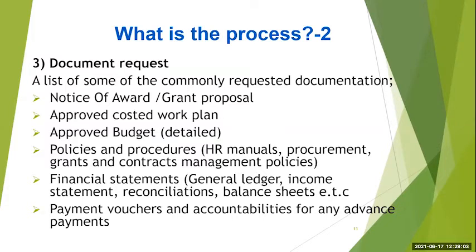So you need to make sure that everyone on the project payroll has at least an assignment on that work plan. Secondly, they still compare that with what you put in the proposal to see if the activities that you're planning to do are in line with what you're doing.